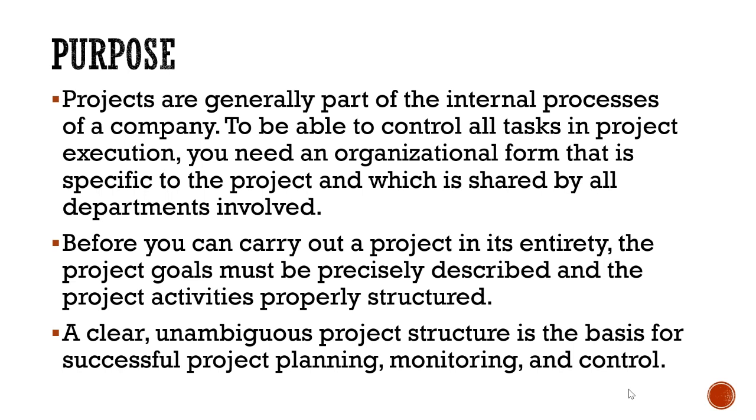I'll explain with an example. In the PS module, the structure will be project definition, WBS, and network activities. That is how the structure is divided. WBS elements will be used in procurement.